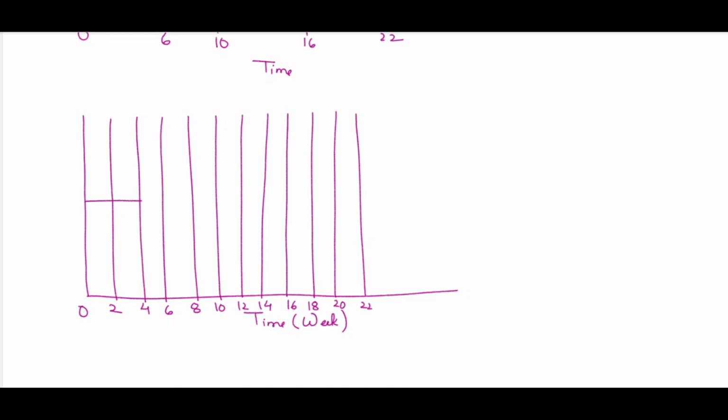Critical activities are 1-2 from 0 to 6. No change till now. 1-2 consumes 8 manpower. Then 2-3 is up to 16 because it consumes 10 weeks, so it starts from 6 and consumes 7 manpower. Similarly 3-5 starts from 16 weeks and consumes 17 manpower. Till now we have not done any changes. So let's see.